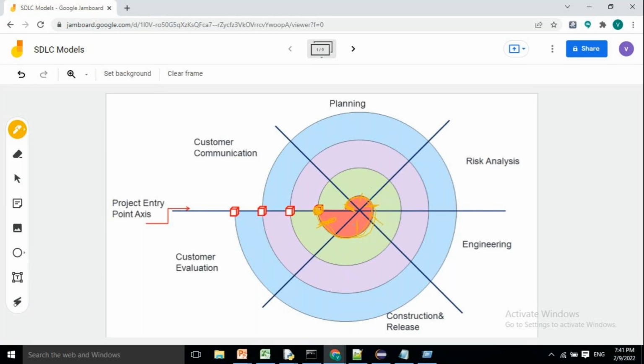Okay, after that, the customer will add some more requirements on top of it. Then again we will consider the requirements, then we will plan, then again do the risk analysis, again design, then development and testing, and deployment and maintenance. The only phase which is added additionally is the risk analysis. Each and every time we will do the risk analysis involved in the iteration.